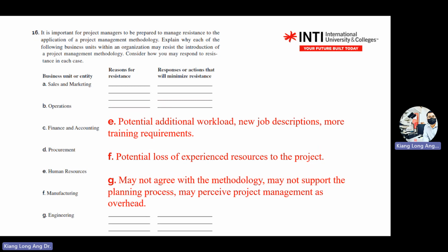Okay, manufacturing department. So this one, they fear the loss of experienced resources to the project. This one is more on the department, because when they share the sifu, the old man that is so experienced, they might be scared that their production floor schedule might be delayed because of your projects. Especially those big companies that have many projects.